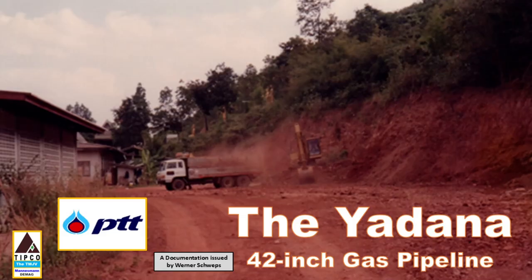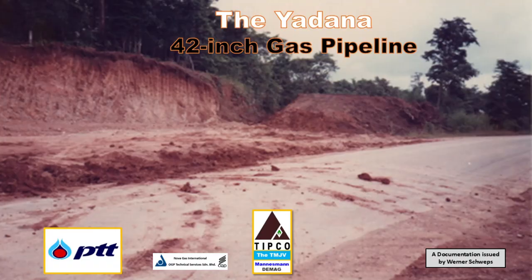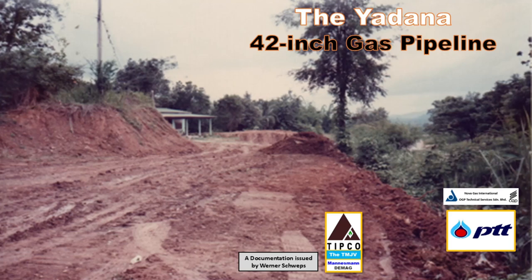To allow the pipeline right-of-way to progress, we had to remove a substantial portion of the hill, as the planned pipeline route went directly through it. Our earthwork is illustrated here in the accompanying pictures. The monks at the Wat were very concerned that part of the Wat structure might slide down the hill. This concern led to numerous work stoppages and lengthy discussions that lasted over 3 months. However, we finally received an agreement to proceed with the hill cutting work in late 1997.